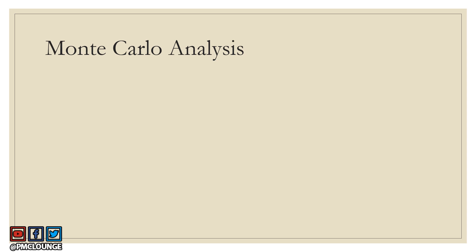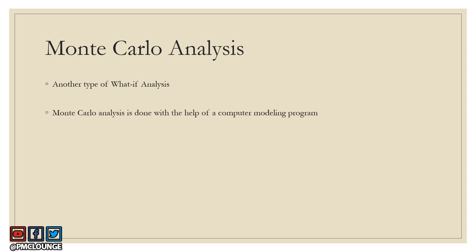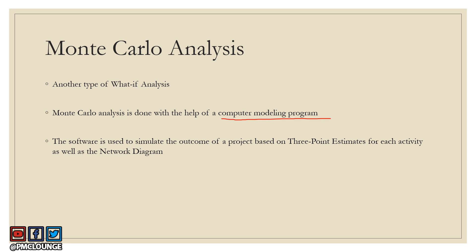The second tool is Monte Carlo analysis, which is also a type of what-if analysis. The key difference is that you're using a computer modeling program to perform the what-if analysis. This software simulates the outcome of a project based on three-point estimates for each activity as well as the network diagram. Three-point estimates are covered in the second link in the description — the schedule management knowledge area playlist.